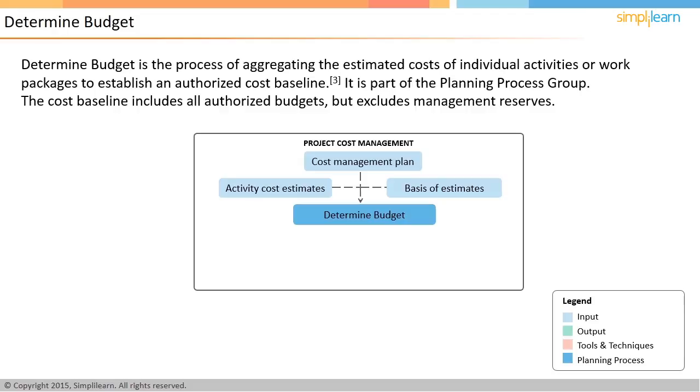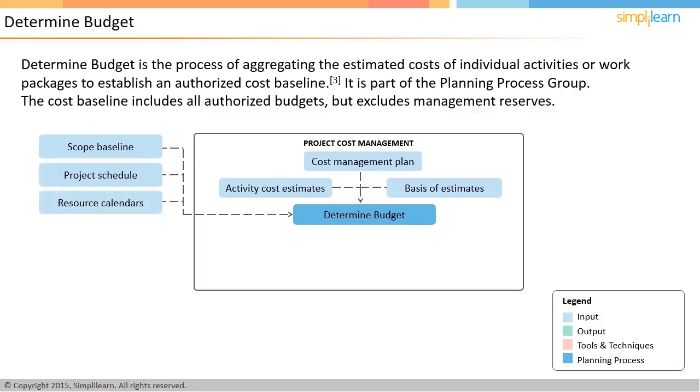It provides guidelines such as the budgeting cycle, tools and techniques used to prepare and approve the budget, etc. In addition to these two important inputs, scope baseline is also looked at. Project schedule provides aggregate cost in a particular calendar period to ensure how much money can be made available during that time. Similarly, resource calendar provides information on the resource, which is assigned to the project at a particular point of time. This information is then used to indicate resource costs over the duration of the project.